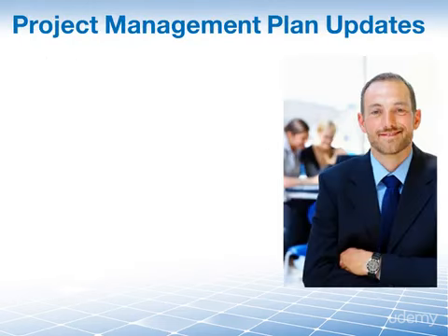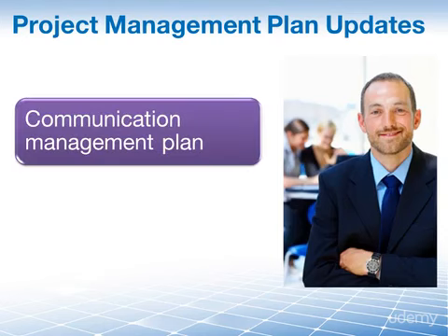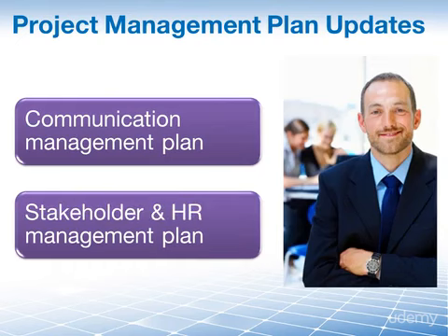Simply put, when the control communications process triggers any change, it may need to be reflected in the project management plan. For instance, the communications management plan may potentially need updates. Well, we just changed the frequency of our status report from weekly to every 2 weeks. We need to document that somewhere. The communications management plan seems like the right place. Other areas that might be impacted by this result are the stakeholder and human resource management plans as well.